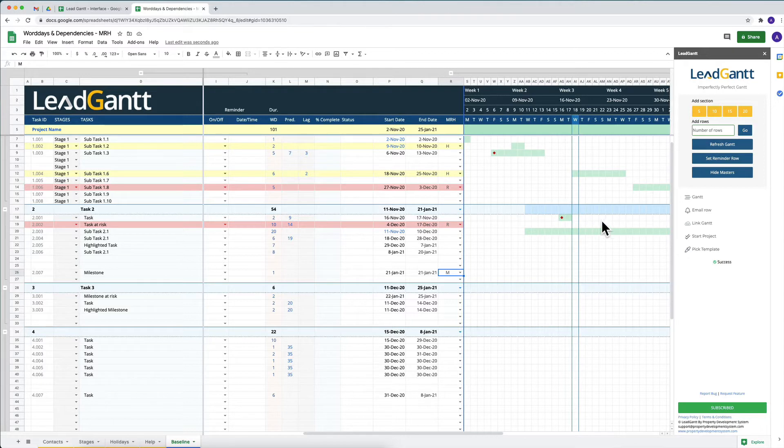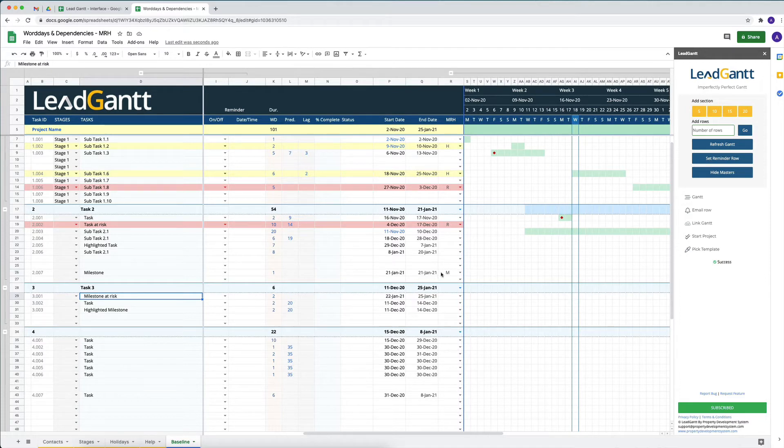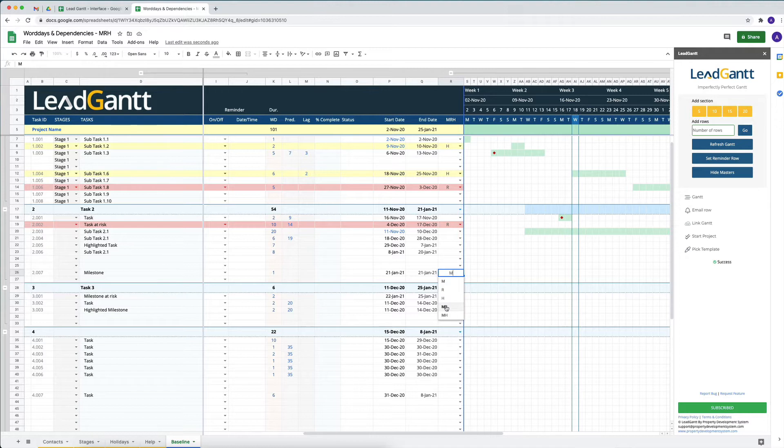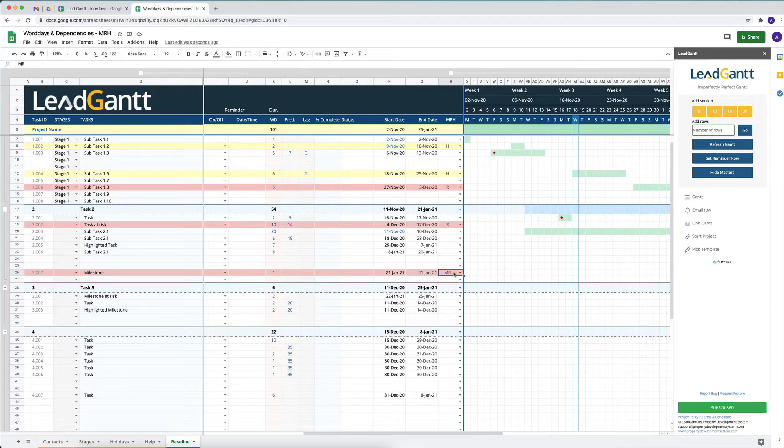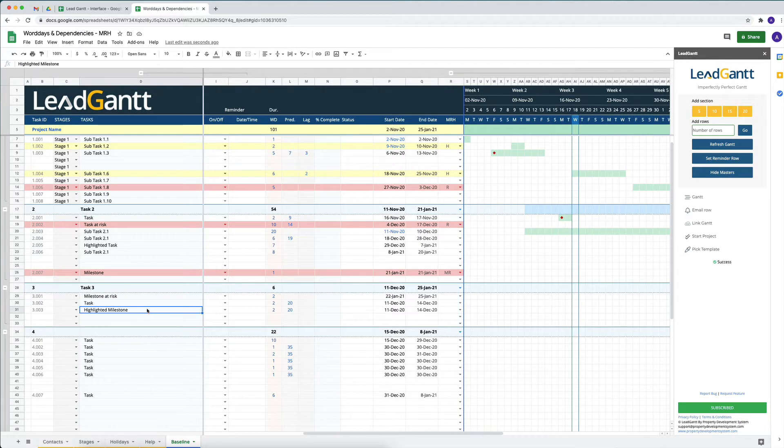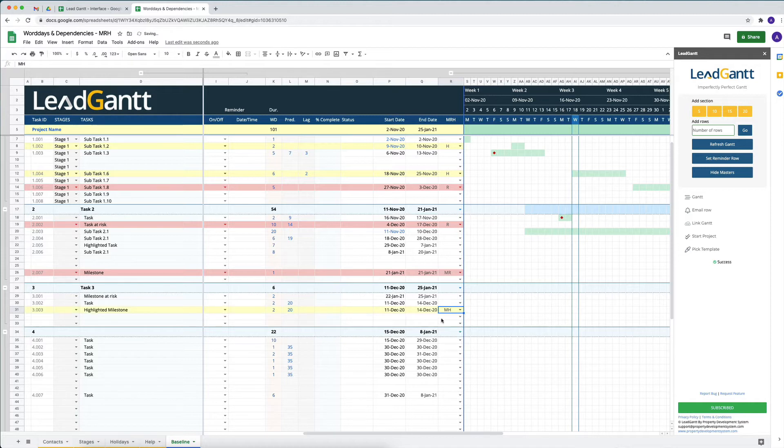When we refresh the Gantt chart this is going to come up. If a milestone is at risk, so let's say this is milestone and this was at risk, all we have to do is select milestone at risk and it will highlight that as a red color so that people can actually see what it is. If there is a milestone and you want to highlight the milestone, it's milestone highlighted, it's MH, and you can mark that.